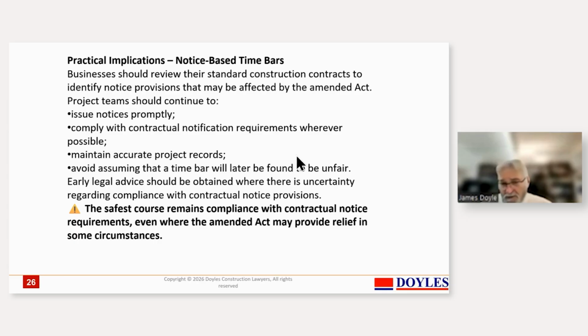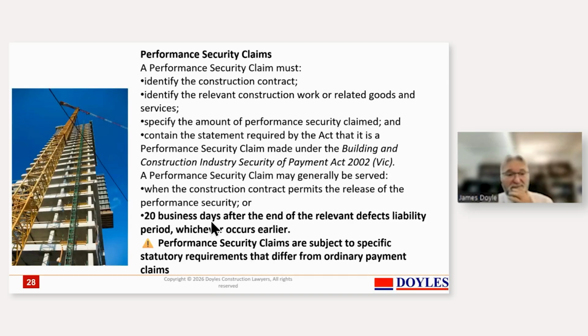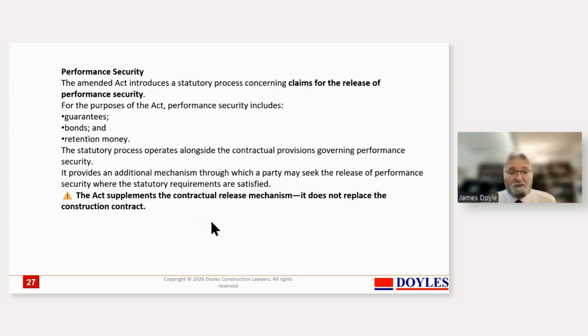The other aspect that's important to realise, and there's been a recent case on it, is performance security. The courts have started to develop a bit of a distinction between a performance security, that is, you put up a bank guarantee to secure your performance. If your performance is regarded as terrible, the courts are a little bit liberal in letting someone cash that.